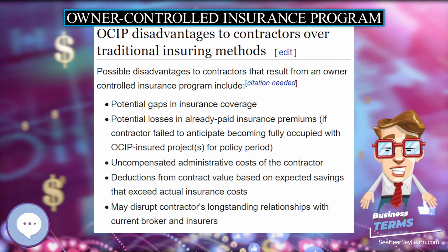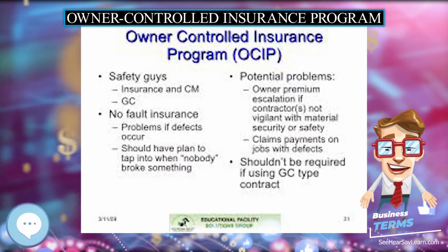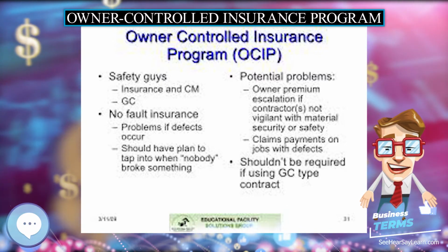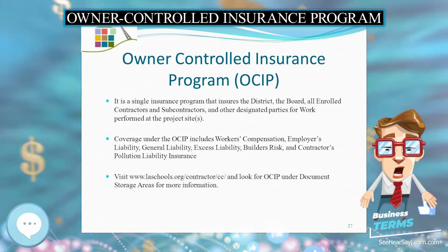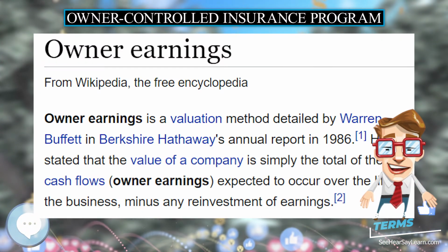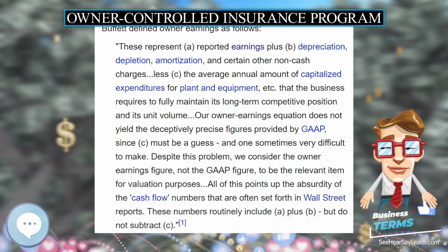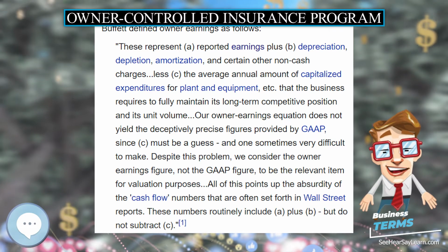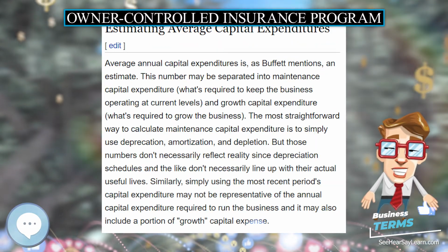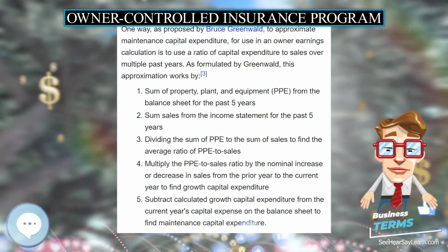The traditional method for insuring construction consisted of each general contractor, GC, and subcontractor obtaining their own insurance policies from any provider of their choosing. In turn, they would build their policy premiums into their cost structure, which then became part of their bids. This meant that by accepting a GC's successful bid, the property owner was indirectly paying for administrative overhead at dozens of separate insurance brokers and insurance companies.